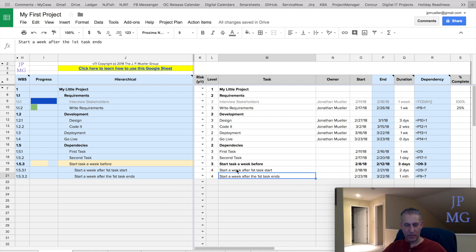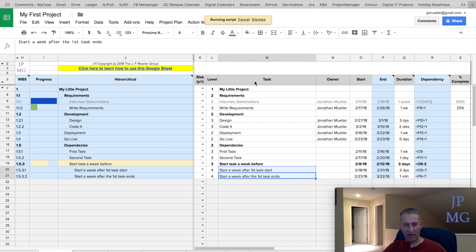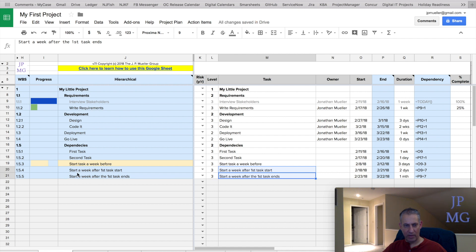So let's say I want to outdent it. We could highlight them and go back to project plan, indentation. And now we can move it out, which will decrement this by 1. Notice it's 3 now. Notice the hierarchy of the indentation went to the left, and notice we're back to 1.5.4 and 1.5.5.